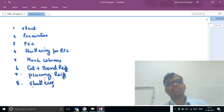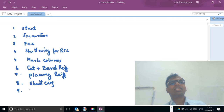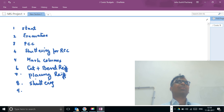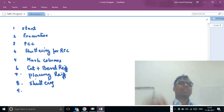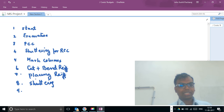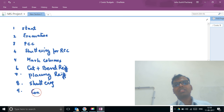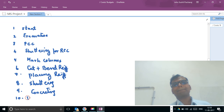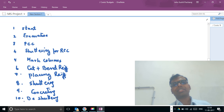You place the reinforcement, do the shuttering, then go for concreting, then de-shuttering, and then curing.